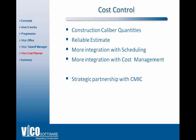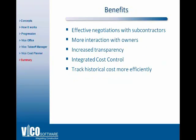This will also help you create not only a more reliable estimate initially, but it will also help you track information at a higher level of detail and capture cost, capture quantities at a higher level of detail for your historic database. So in summary, the benefits of using a model-based system for estimating is that you can explore the scope and understand the scope of a project a lot faster, a lot easier, which in turn will enable you to negotiate with subcontractors more efficiently. If you understand the scope to the same level of detail that the sub understands it, you will not have any disputes about quantities, you will not have any disputes about different line items in their quotes.